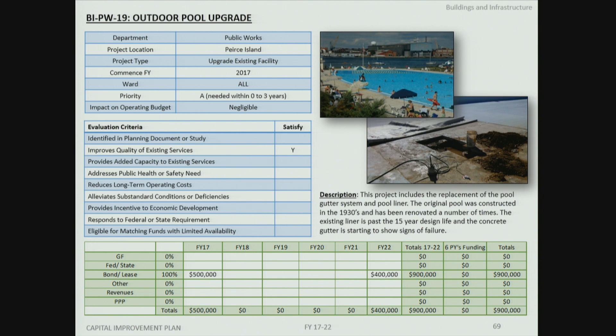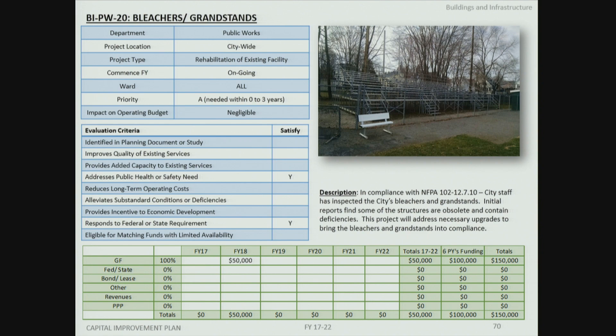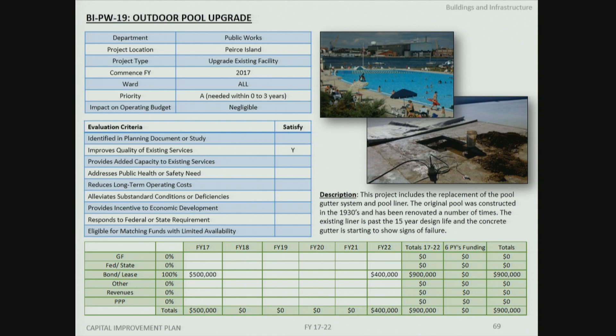The next item addresses replacement of the liner and gutter system for the outdoor pool, which has outlived its useful life. The City Manager also clarifies for the public that the pool will not be closed during the wastewater treatment plant renovation and expansion — the entry configuration will be reconfigured to the opposite side of the pool toward Four Tree Island, with temporary bathhouses, ensuring the pool remains open.